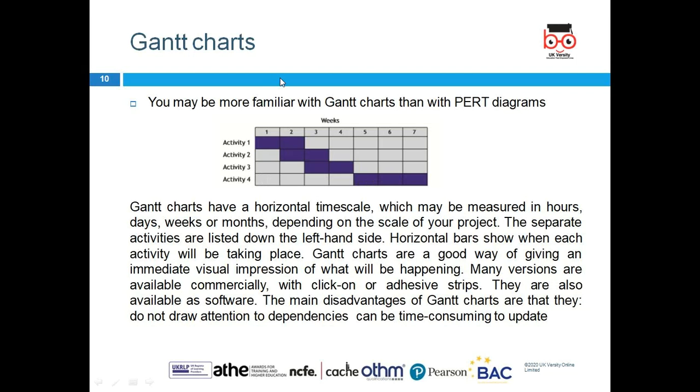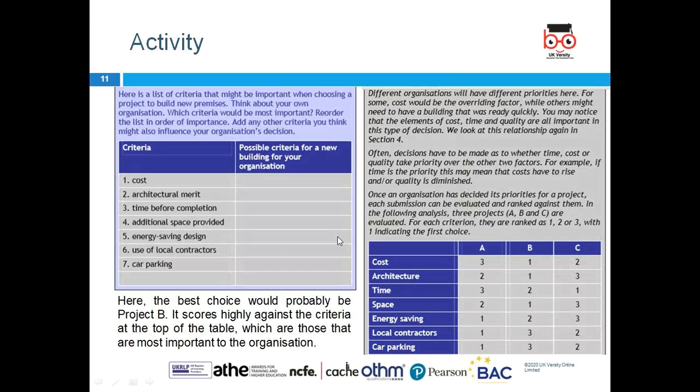A Gantt chart is quite useful to look at what activities and what dates. So we can say week 1, week 2, week 3. So my week starts, and I finish, for suppose, the basement, walls, and roofing in 2 to 3 weeks. 2 weeks will be taken. Then we go to tiling, which will take time, and then the next activity. So we can look at how many weeks we need to complete our project, for suppose any sort of construction. It depends, it can be more than 7 weeks, but the Gantt chart is meant to show and plan the activity, go back and review it and evaluate it. That's our activities.